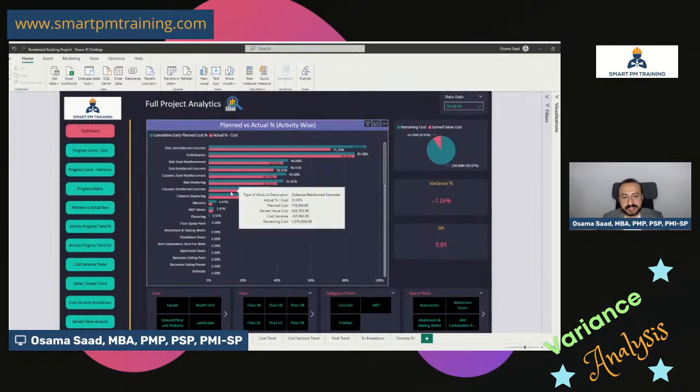So I will hover over this activity. It is in delay clearly, and I can see the cost variance is a 100 grand shortfall. That's quite significant. I know that, you know that, because it's a concrete activity, but sometimes it is not top of your head, right? You really doubt if the activity is significant enough or not. For other activities, you're going to see maybe the cost variance is $1,000, right? So I will not pay attention to it right now. I'm going to take a note and come back to visit it later. But that's what I meant by not all delays are treated equal.